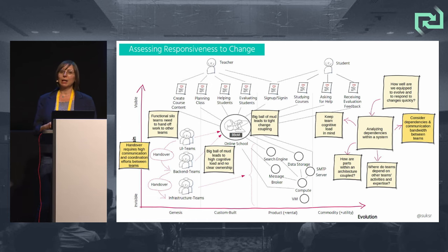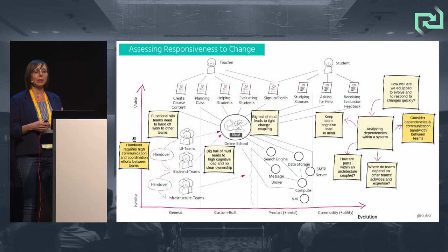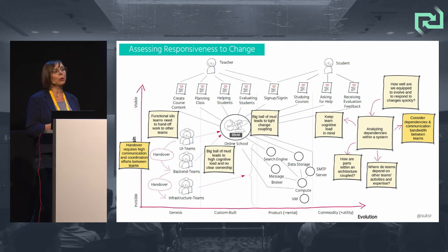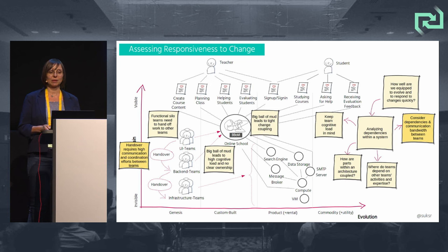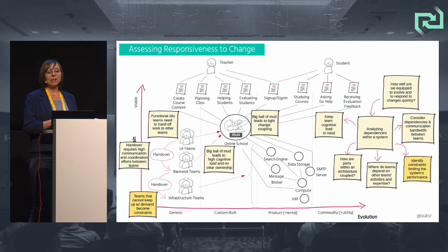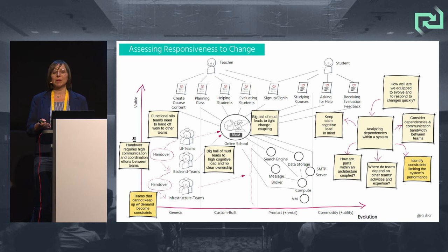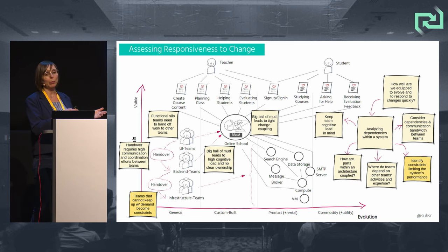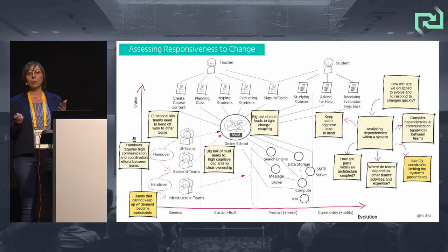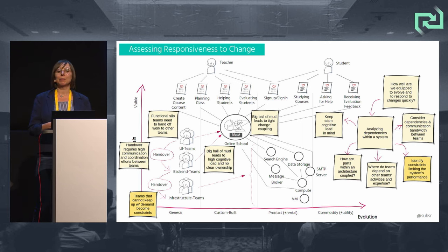That handover requires a high amount of ongoing and frequent communication and coordination efforts between multiple teams to implement and deliver changes. If teams cannot keep up with the demand placed on them, their work piles up, causing other teams to wait — their work cannot be completed and delivered, so they become constrained. And constraints in the system dictate the system's overall performance.